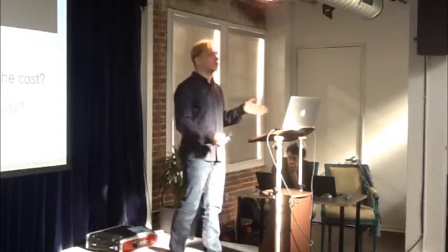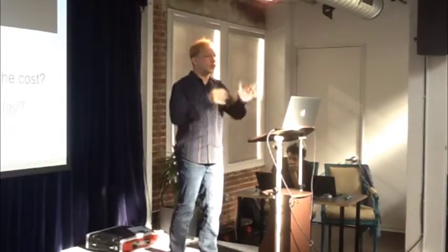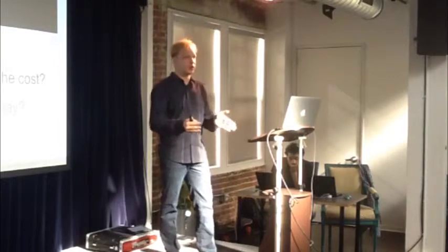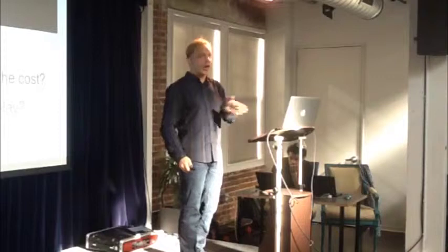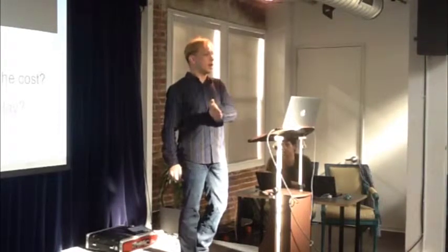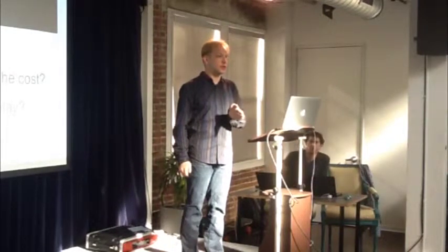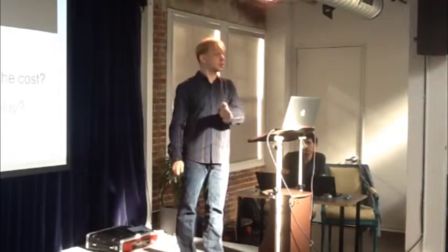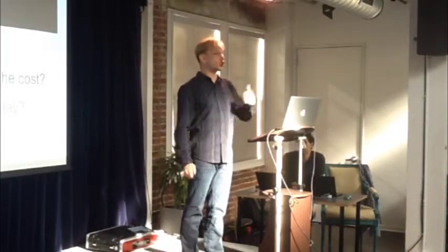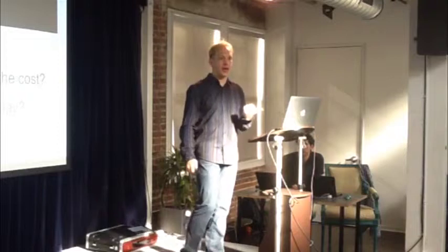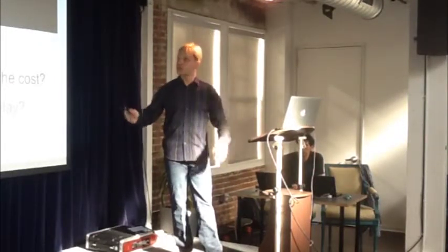Secondarily, if this is something we're including before a launch, right? So let's add this feature because we really want the site to be perfect before we put it in front of users. Remember that that delay is lost sales. Every week that you don't get your site out is a week's worth of potential users who never found your site in the first place, and it's a guaranteed lost sale. So it better be adding enough at the time you do launch to make up for the losses you've already had by adding that.